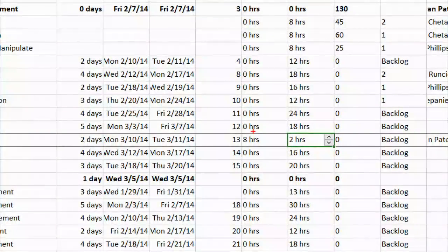So the question was, do the actual values that are coming in go to a custom field? The answer is no, they go into Project Server regular actual work. Okay, Chaitan? So this actual work is at the task level. The timesheet is at the, if your question is related to, right, because you can parse the two out.